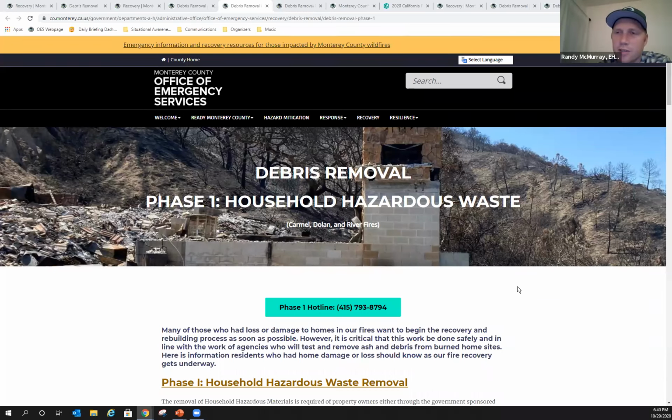Josh, I don't know if you have any comments on the retaining walls. Yes. Okay. So I had a couple of comments. Once you get approval from the health department for the work plan, then that's when the demo permit would be issued. And so those walls would be identified on your demo permit as walls you're going to remove. The biggest thing is, if they are retaining walls, we're going to want to know how you're going to resupport that area. And you might be better to wait until you do the rebuild permit as part of rebuilding your new house. But if they are just freestanding, non-retaining landscape walls, then that would just be part of your demo permit application. And once authorized by EHB to issue that, we would be able to issue that permit, and then you'd be able to take them down. Thanks, Josh.